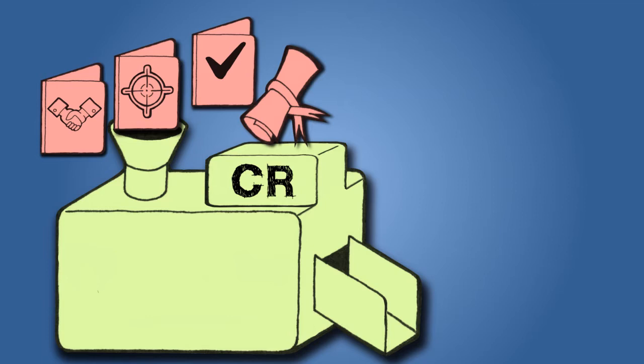Who does the project manager need to talk to in order to figure out a requirement? The best way a project manager can figure that out is to check out the Stakeholder Register. The Stakeholder Register is used to identify stakeholders who can provide detailed information on project requirements.